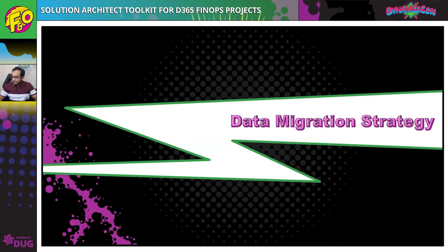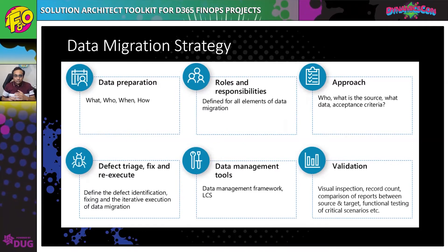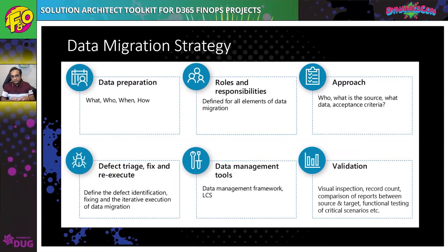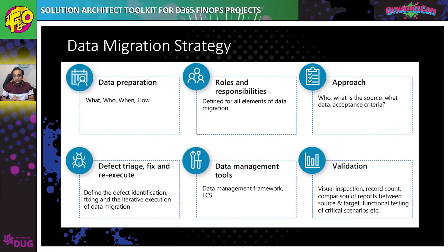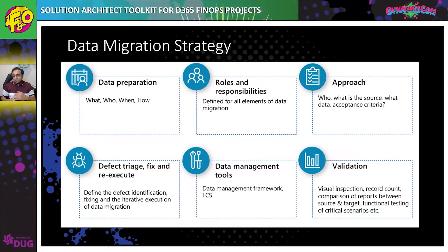Data migration strategy is, in my opinion, one of the most critical parts of every implementation project. It's not only about migrating data — it's about what you need to migrate, from which system, and how you will migrate it. Key questions include: how will you extract the data, translate it, and load it into the system? In large projects there is usually a dedicated data migration team, but in smaller or medium-sized projects this responsibility is divided among architects, consultants, and technical people who work together to load the data.